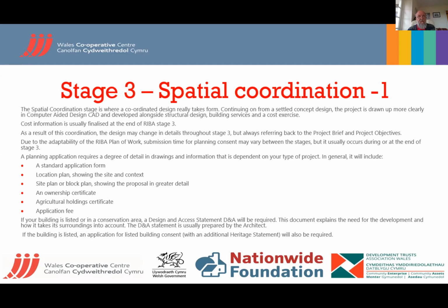Agricultural holding certificate, if it's rural, you could have rights to it. Not many sites, unless they're rural exception sites, would have a holding certificate. And an application fee, which is determined by the local authority. It could be on the number of units proposed, or it could be on the area of the site. And it can run into a couple of £1,000 for that.